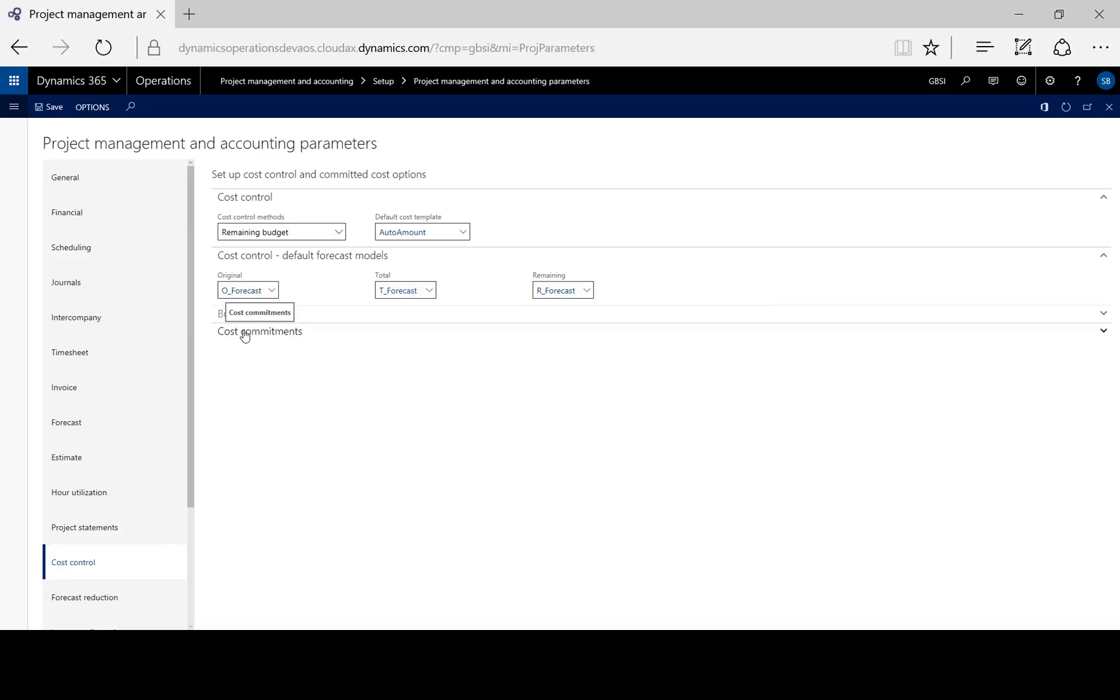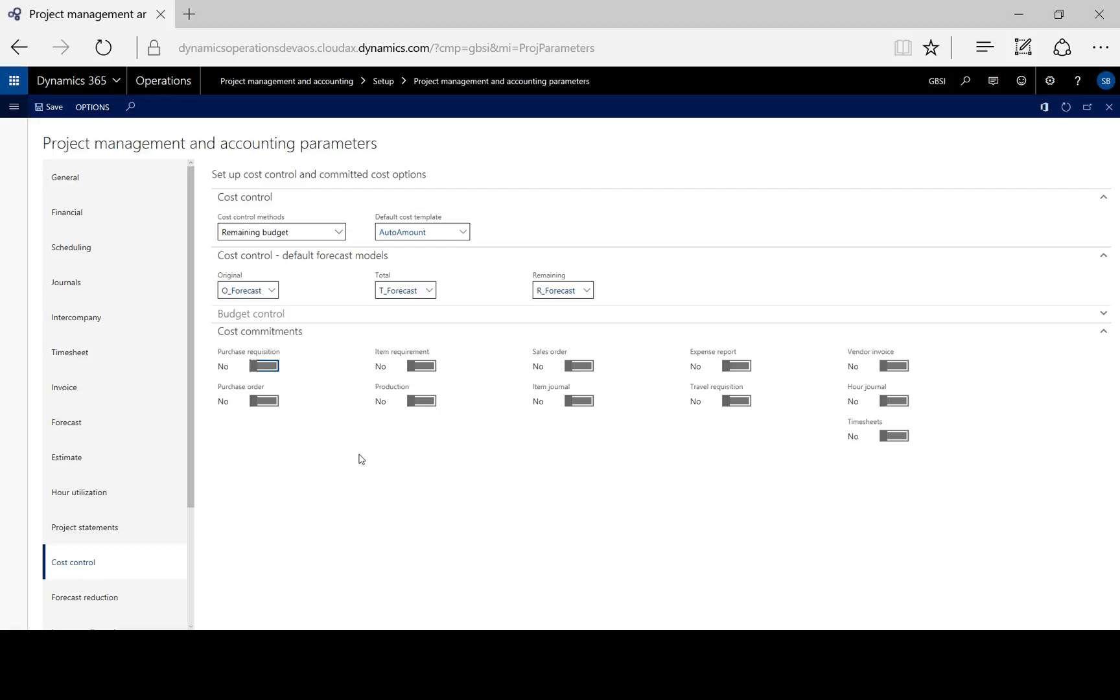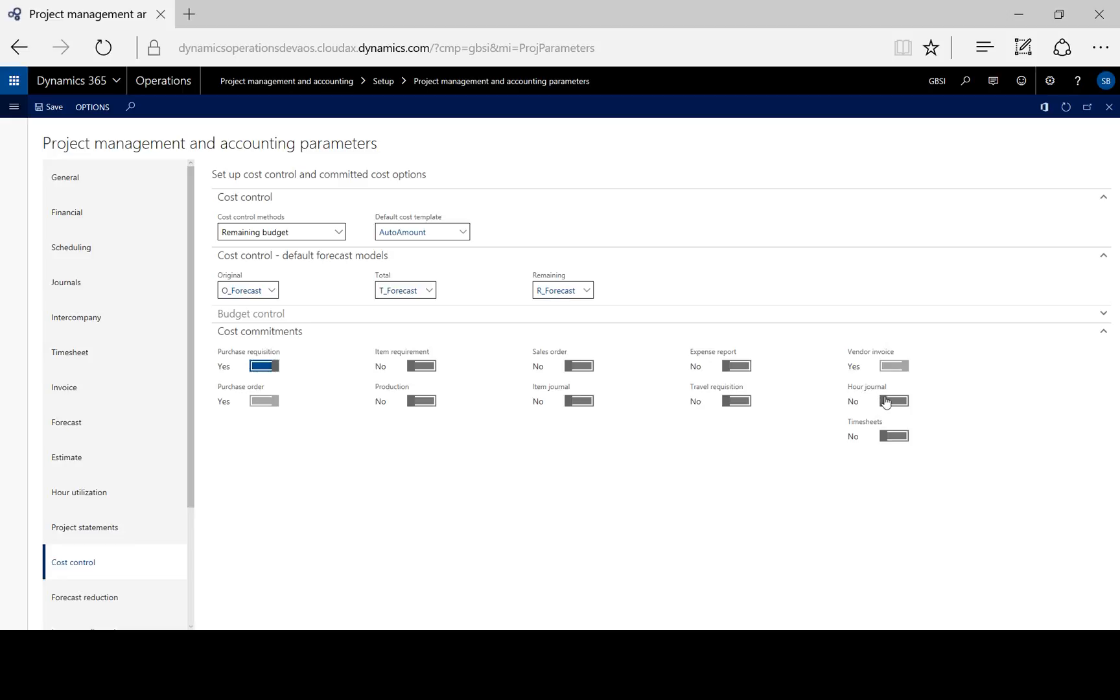Under cost commitments, we need to decide whether we want to budget control before actual costs are posted or only when actual costs are posted to the project. To perform budget control when the actual costs are posted to the project, we leave all the toggles off. For budget control before the actual costs are posted, that is submitted to the project budget, we toggle on the desired transaction type.